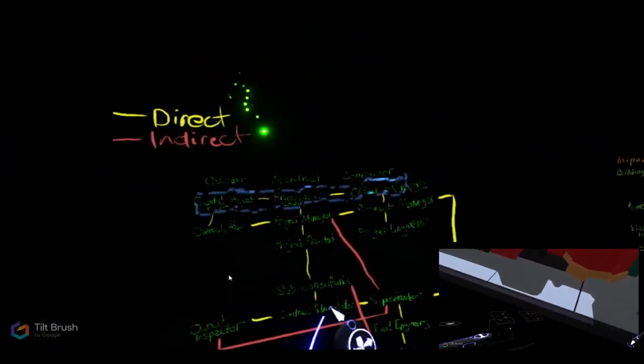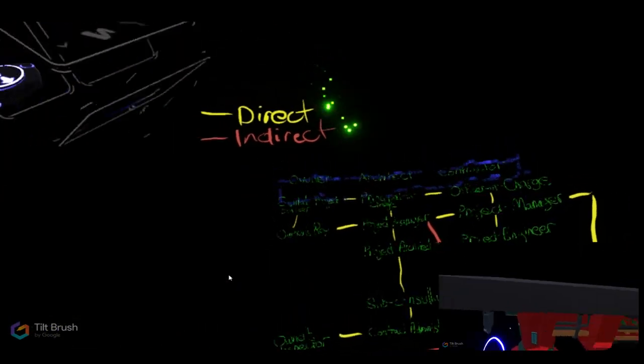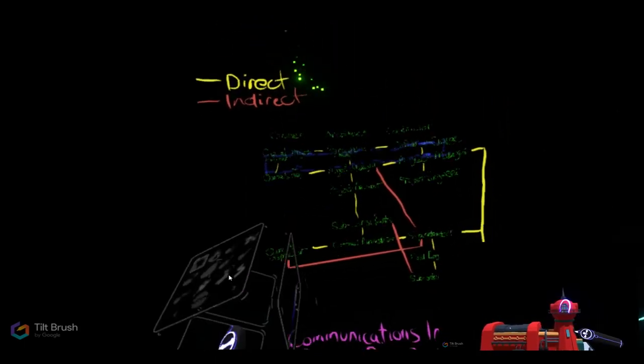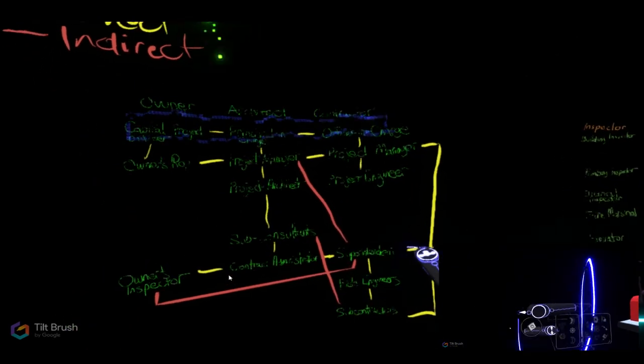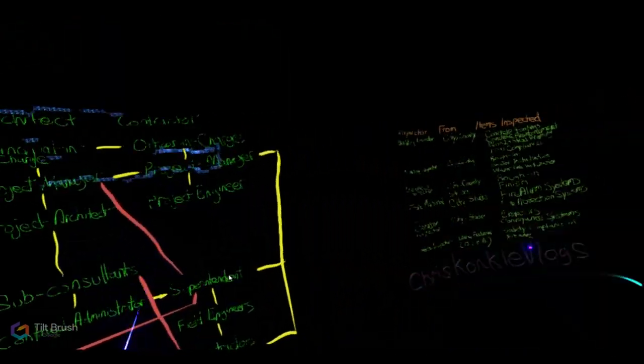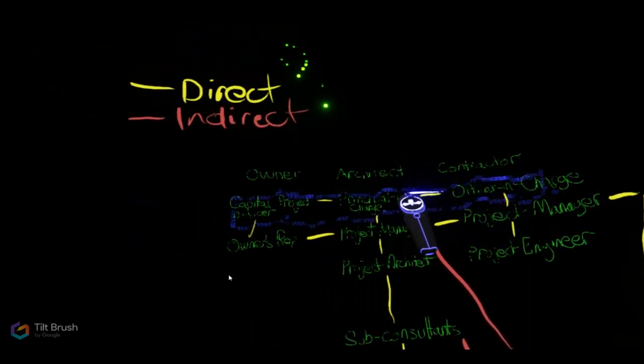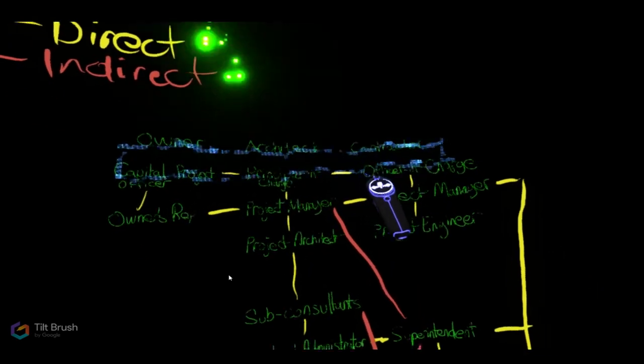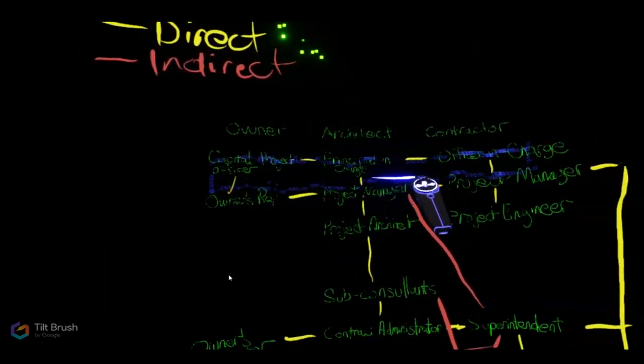We're still in the design bid build delivery model. There's an owner, an architect, and a contractor, the prime contractor. I have done a drawing here that demonstrates the lines of communication. Direct or contractual communication is in yellow, the indirect and informal lines of communication is indicated in red. Generally we communicate at the same line, so capital projects officer for the owner will talk to the architect's principal in charge, who will then talk to the officer in charge for the contractor.